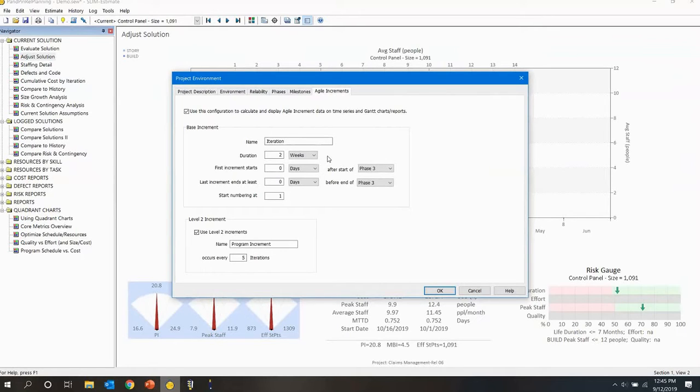Okay. So the next question is, can the number of weeks per increment change, like starting with 2-week sprints and then going to 3? Not within one particular release. So in Slim Estimate, we are modeling releases because of the level of development and testing being done. The assumption is that most organizations are defining a consistent cadence, and that really has been our experience. You could select a different number of weeks or increments for separate teams or for the next project, but within one release that you're estimating, they need to be consistent.